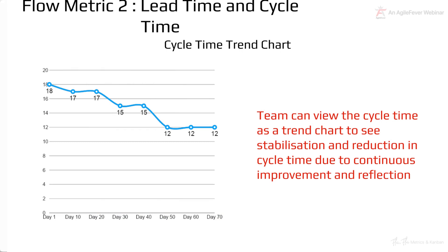Another way to visualize cycle time is the cycle time trend chart. If you're working with items of varying sizes, the trend chart would be very erratic — and that gives you a good sense of what's going wrong. But if you have a rock-solid process with cycle time collection and tracking in place, the trend should technically be on a downward spiral because you are continuously making improvements, looking at the data, and making more changes.